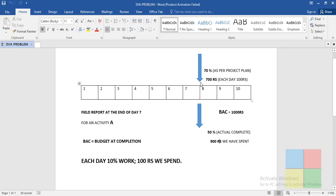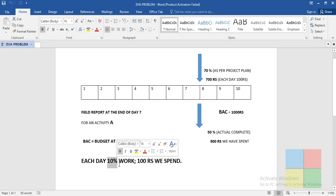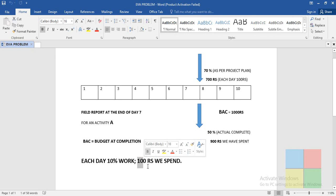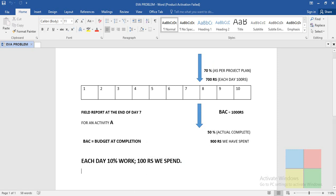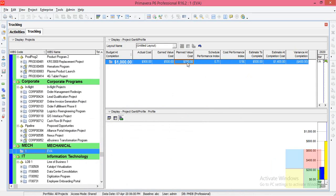Planned Value (PVC) means at the end of the seventh day we should have finished 70% of work. Each day we finish 10% of work and spend 100 rupees, so for 70% of work we would be spending 700 rupees as per the plan. That is the planned cost.